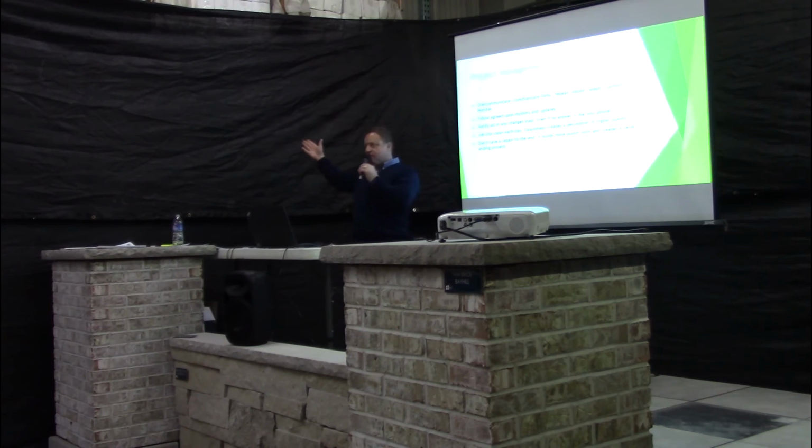Well, what happens is the customer sits and stares at that for 3 weeks or 2 weeks. And every time they look at those cabinets, they think, well, I thought these were high quality cabinets. They look like crap to me. Because they're looking at something that's not finished. So when you do something on a job and it needs fixed or it's not finished, you want to finish that. You don't want to leave somebody sitting and staring at something that looks half done the entire time. And you don't want to create punch work that creates a never-ending project.